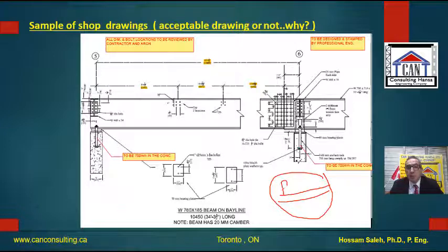So with the stamp, now you can start looking at this drawing. Without this stamp, you can't accept the drawing. So my advice is, if you don't have the engineering stamp on it, don't lose your time, because you don't know when the contractor will bring an engineer, or which changes he will make by himself. Okay.